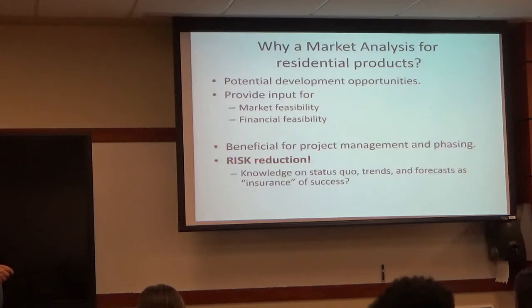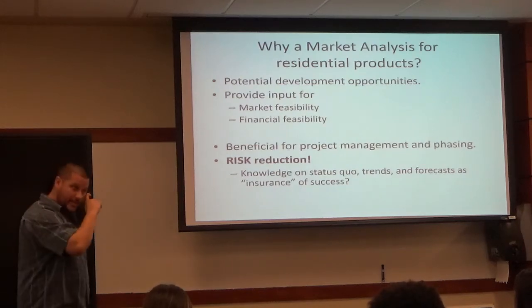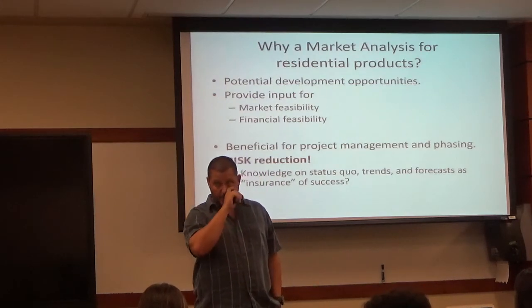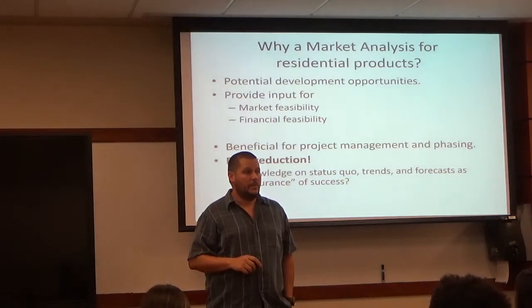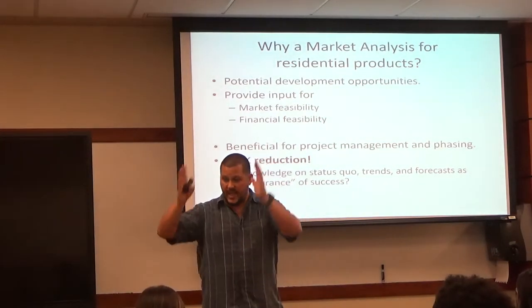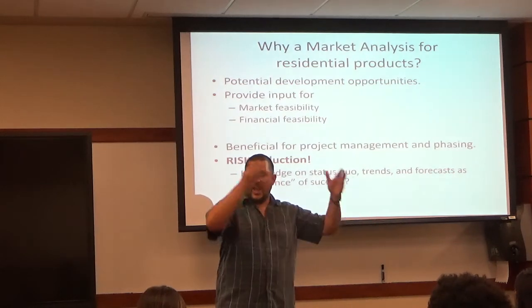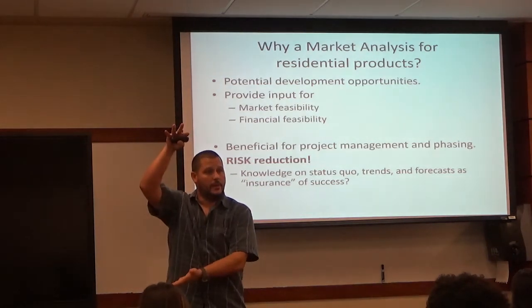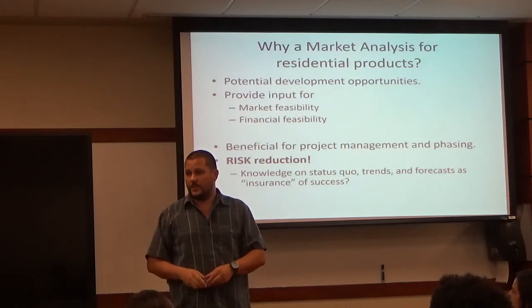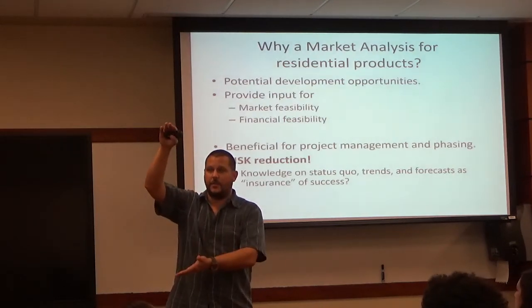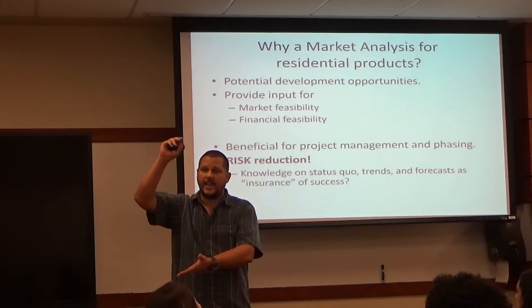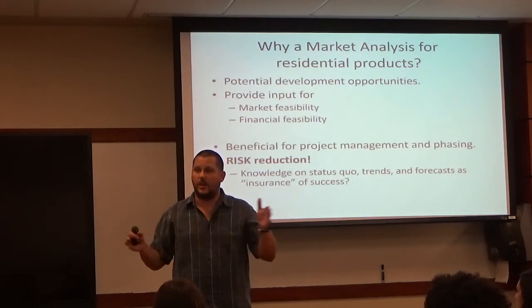Risk in real estate comes also with the project management and phasing. Why not develop 500 units at one time, or do 5 phases of each 100 units? It's a different project management, a little bit more costs. However, if I produce every year 100 units, I have my risk reduced, because I don't put 500 on at one time, but I have to finance that. That's the difference. Also, what if I build 500 at once and can't sell them? Because the market is not there. So if I know exactly what's going on with market demands, I can phase in also my supplies.